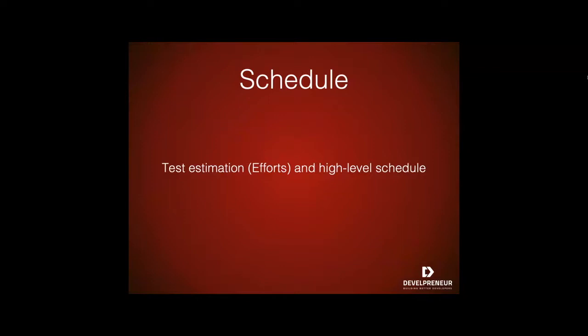So if you have a hard deadline with the client, it may be worth going back to clients and saying, hey, those last minute features you wanted need some additional testing, so we need to push out the release maybe a week or two more. By spelling out the effects here, you have a chance to discuss them in advance of their actual occurrence. You might even get the user to agree to a few defects in advance if the schedule slips.